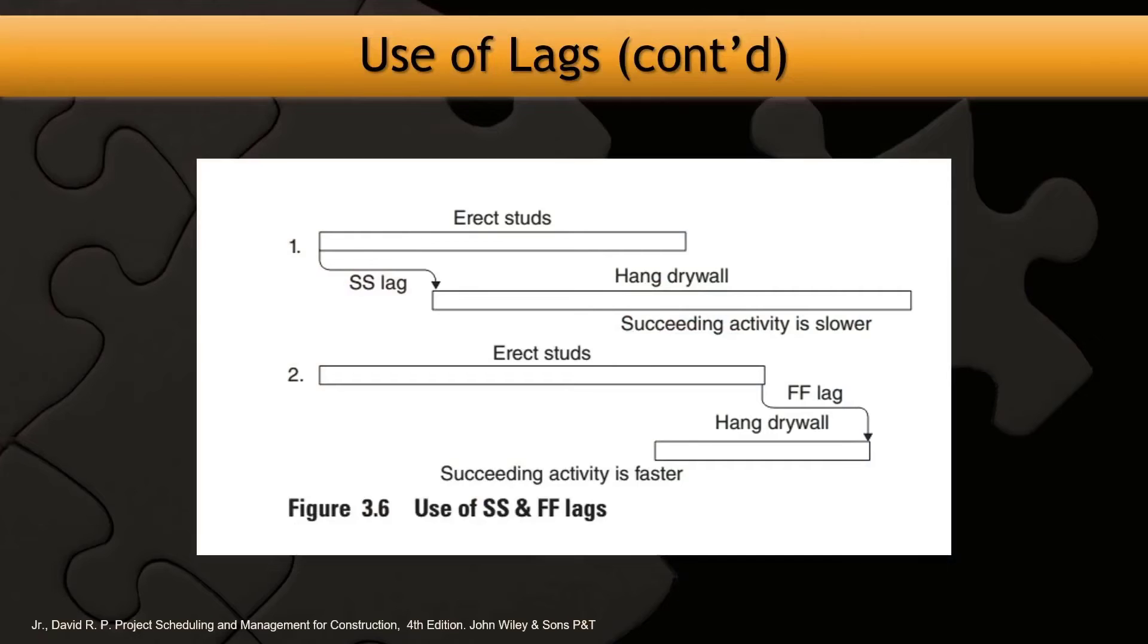Usually the thinking process for that is: if the succeeding activity is slower, usually start-to-start is a good way to overlap activities. But if the second activity is faster - the second succeeding activity is faster - it's better to use finish-to-finish.